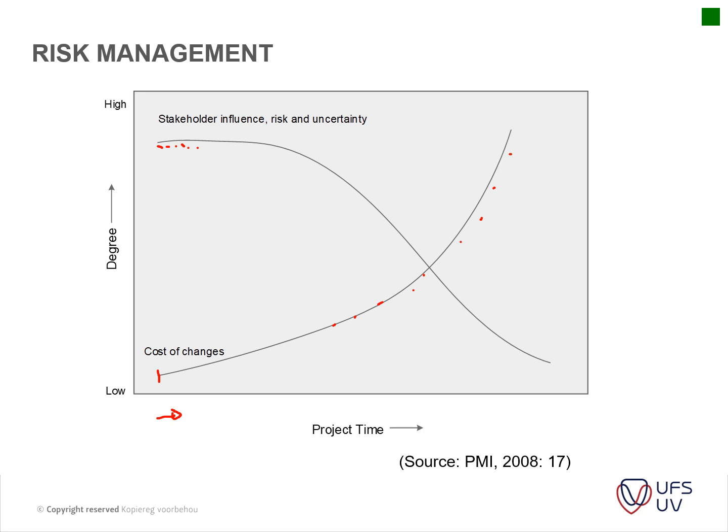That type of information you need to gather, and does this person really have the funds to fund this project? Is there a communal buy-in into this development or not? That's the type of risks that is involved, and that lessens as the project goes on. The more information you get, the less that risk becomes.